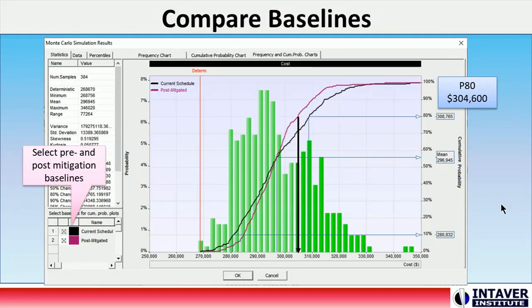In the project summary, we can compare the results of the pre- and post-mitigated baselines. In this case, we can see that even with the additional activities, at a P80 confidence level, the mitigation efforts will save about $4,000 and should be a good candidate for including in the final project plan. This way, we can determine the efficiencies of mitigation efforts.